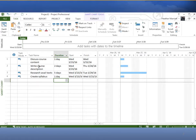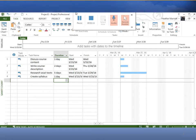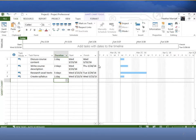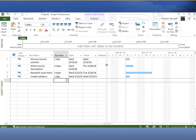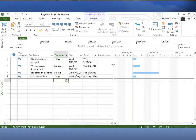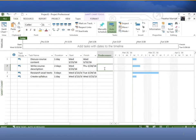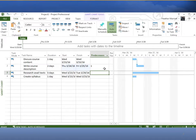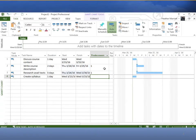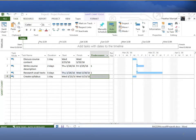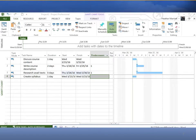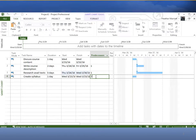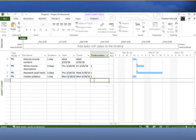We were told that you couldn't do tasks two and three until task one was completed, so we'll need to add some relationships in there, add some predecessors. We'll say task one must be complete before you write the course description or before you research the available textbooks. We were also told that create syllabus, that last task couldn't be completed until the second task was done, the course description was written. So we'll add in that predecessor.